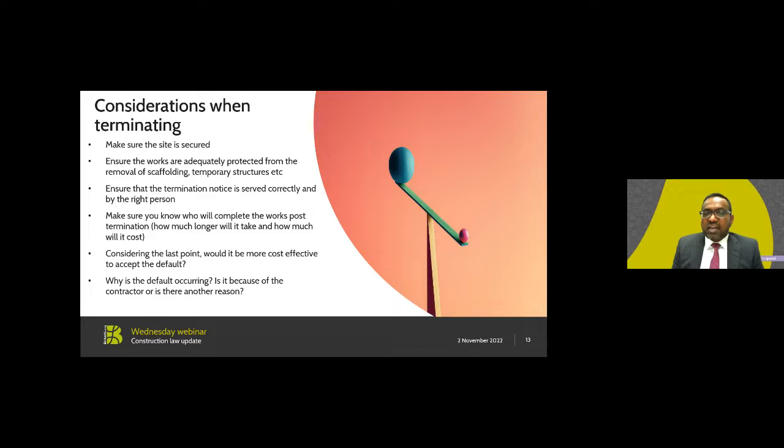Some contracts often add requirements for the form or content of a termination notice. It is also important both to choose valid grounds for termination and to state them correctly. Otherwise, the notice may, in effect, repudiate the contract or fail to exercise the chosen termination right.